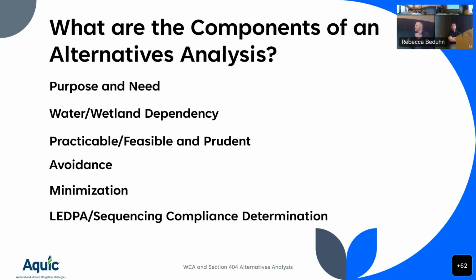So it's on both sides of the table as you're reviewing these applications that both parties have to come up with these avoidance alternatives. So I think that's a really important thing to understand where they fit in the context. Also too, if there is an avoidance alternative out there that exists, that is feasible and prudent, which we can talk about in a second here, the LGU must deny the replacement application. That's not a may, that's a must. So to me, that really emphasizes the importance of this part of the review.